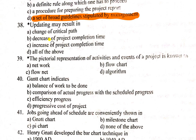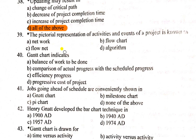Question number 38: Updating may result in change of critical path, decrease of proposed completion, increase, and all of the above — so all of the above is the correct answer. The pictorial representation of the activity and event of a project is known as a network diagram. A network diagram is a type of diagram in which the activities and events of a project are represented.